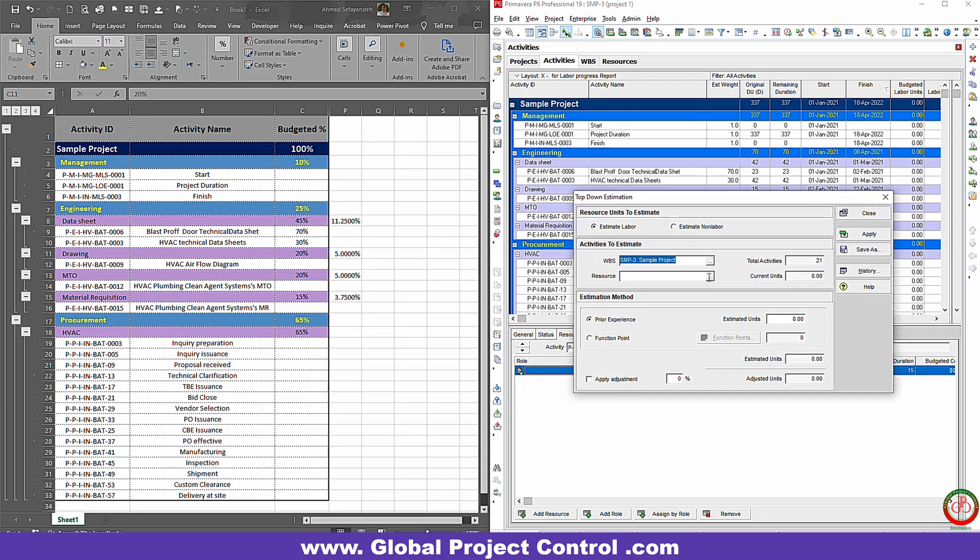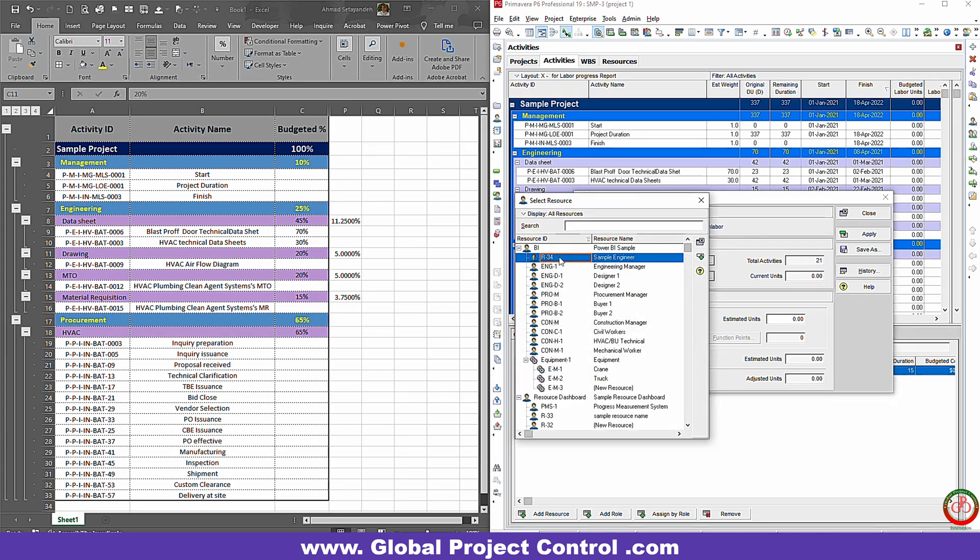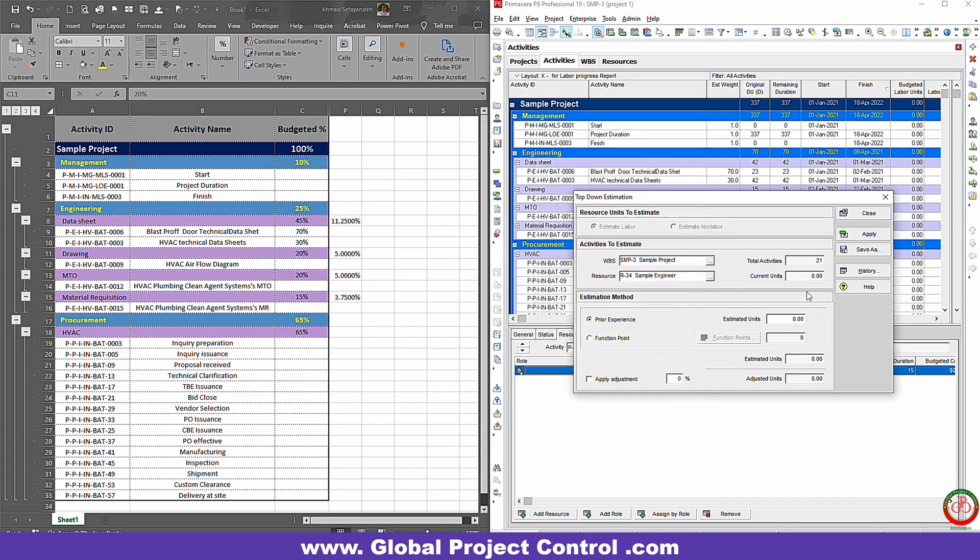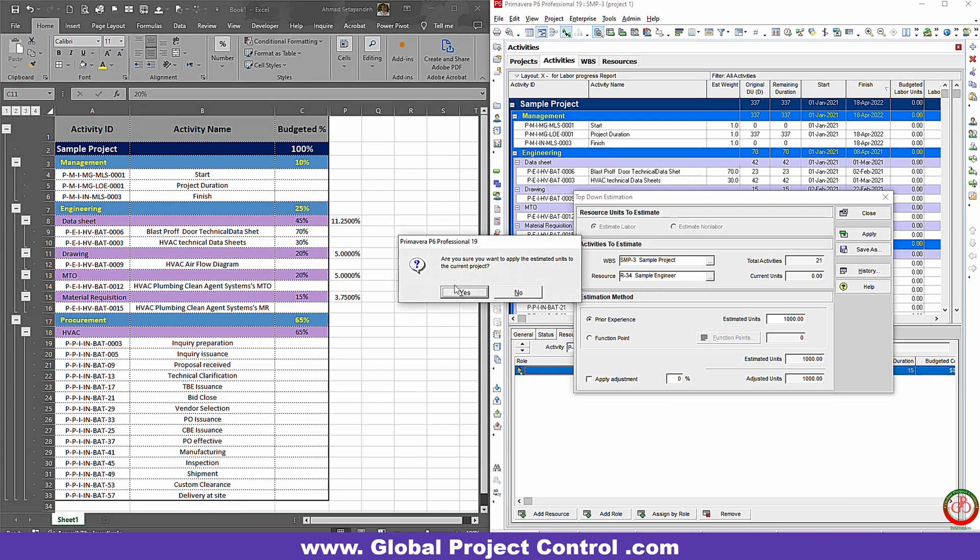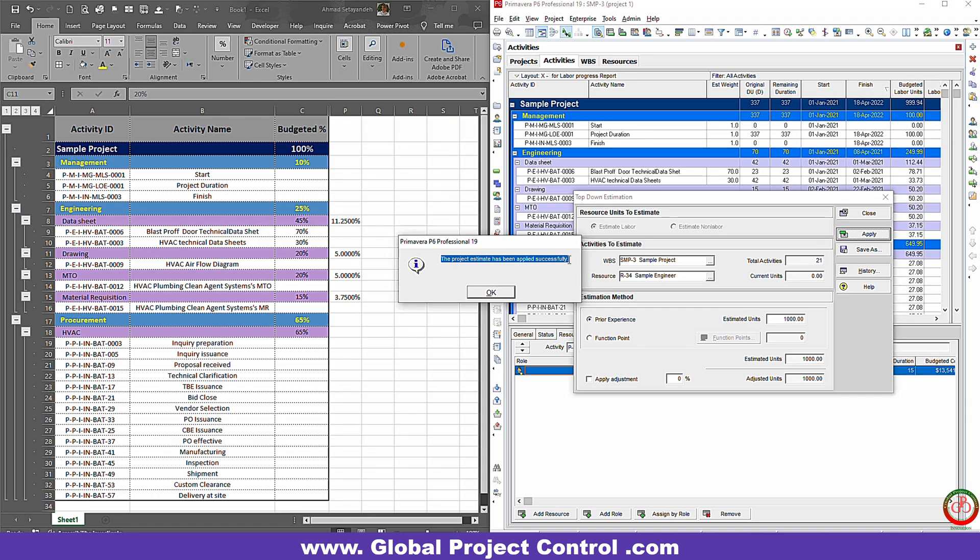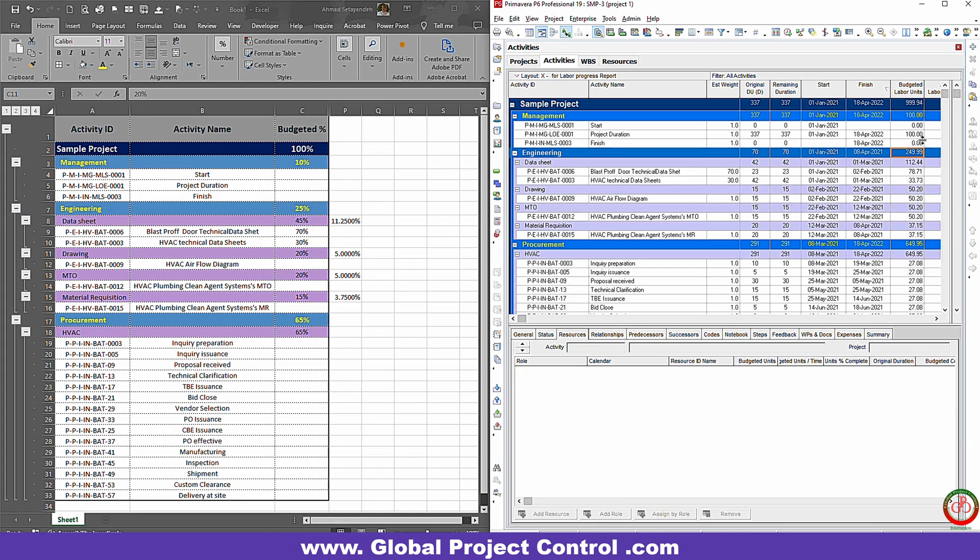Now I go through the Tools, top-down estimation. I already assigned one resource to my schedule—it is sample engineer. I try to add 1000 resources over here, and I need only to apply this. The project estimate has been applied successfully.